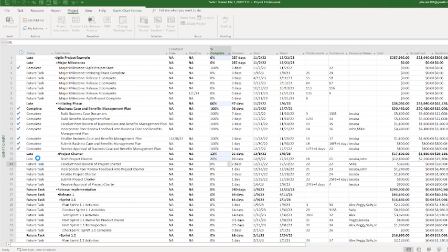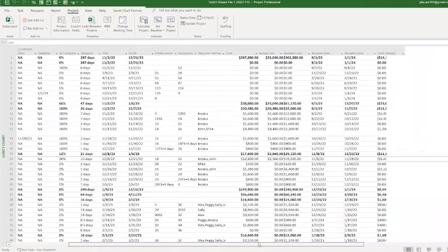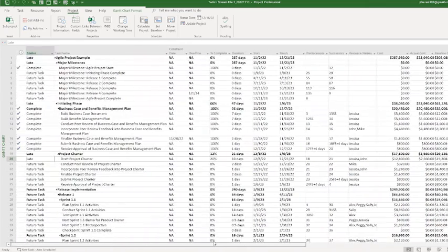Again, as I'm demonstrating here, this is why the status column, this automated column, is useless. Because this, again, is only based on percent complete. So you saw for the first time, when I did 50%, it went, oh yeah, it's on schedule. And then when I did it here, I'm only 20%, now it's late. And that's not helpful because maybe I am still going to meet that finish date. I just didn't get a whole lot done, and I'm going to make it up next week, right? That's not what that's taking into consideration.